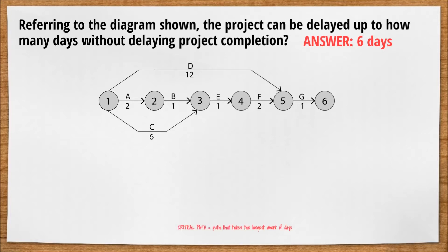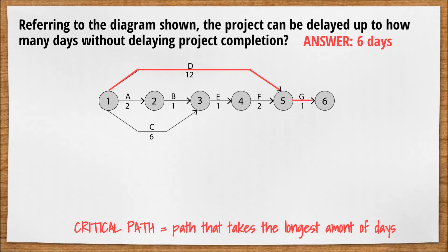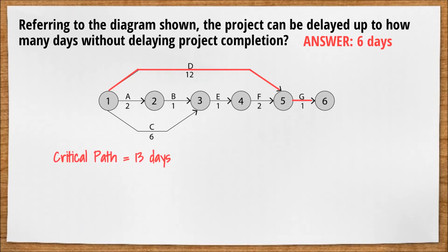The critical path in this diagram is 1, 5, 6, which is equal to 13 days. The other options are float paths.